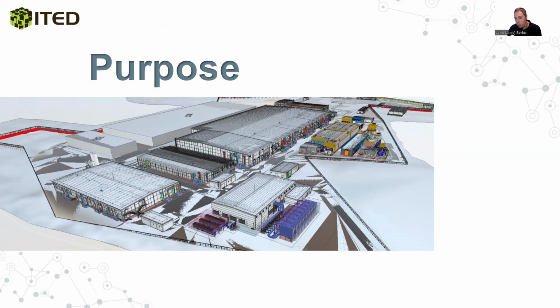I've been fortunate to work on several very large international projects, for example, the development of a salmon farm in Brunei, and I observed one important thing. The outcomes are significantly better when the client is more involved in the process of using BIM. That means fewer changes during construction, greater confidence in the layouts and the solutions, and better usability of the building.